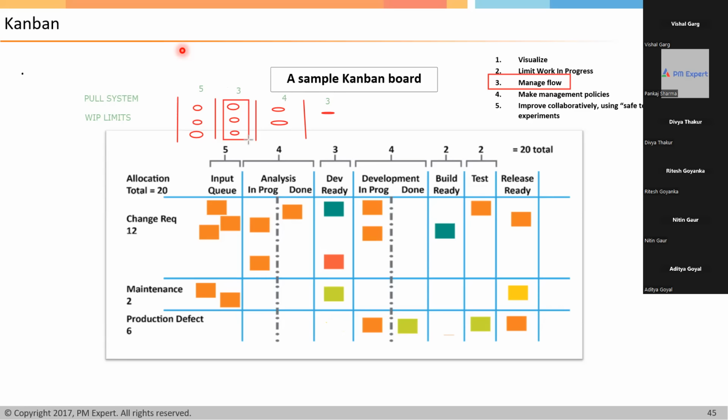Yeah, but this is the bottleneck until we see a predecessor full, right? Now let's say there are 5 tasks. Even if predecessors, what you can do is, in the predecessor column, you can put another column, ready for the next stage, right? Development ready, let's say. Or done. In the predecessor stage, let's say there is an in progress and done. Suppose in predecessor, everything is done, but it is still stuck at this. That means it is a bottleneck process or not?